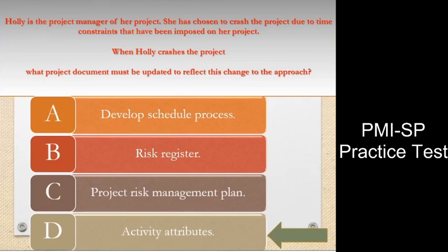The components for each activity during the early stages of the project are the activity ID, WBS ID, and activity name. At the later stages, the activity attributes include activity codes, predecessor activity, activity description, logical relationship, successor activity, leads and lags, imposed dates, and constraints and assumptions.